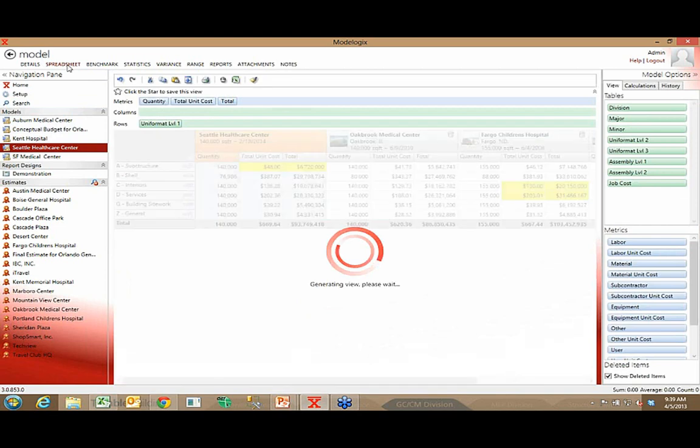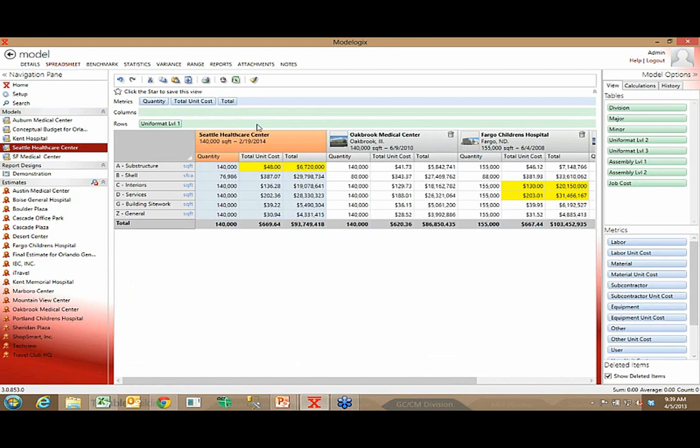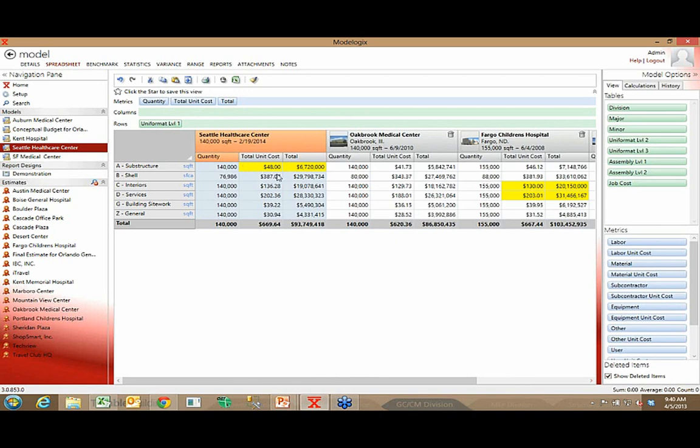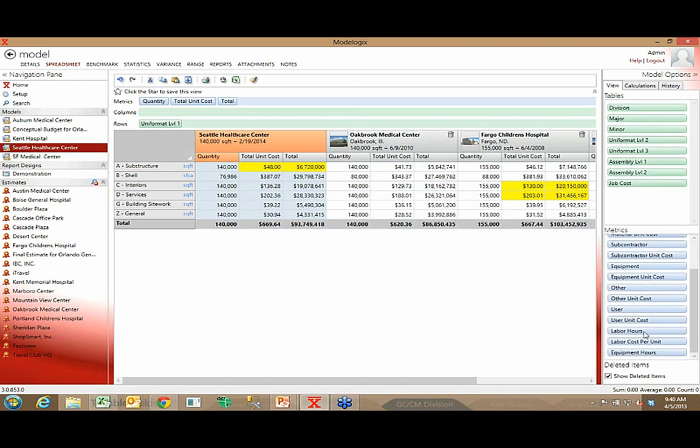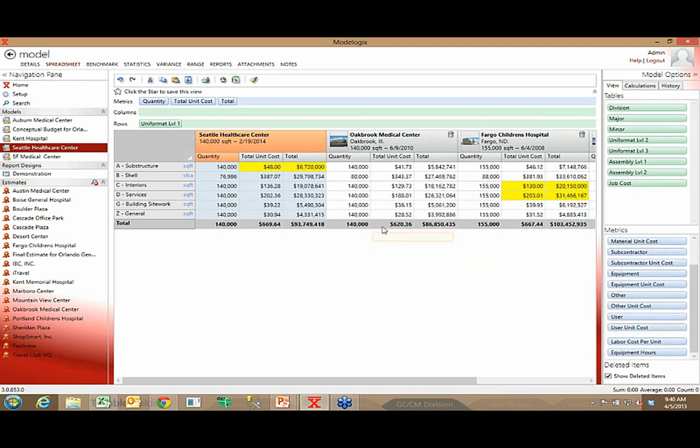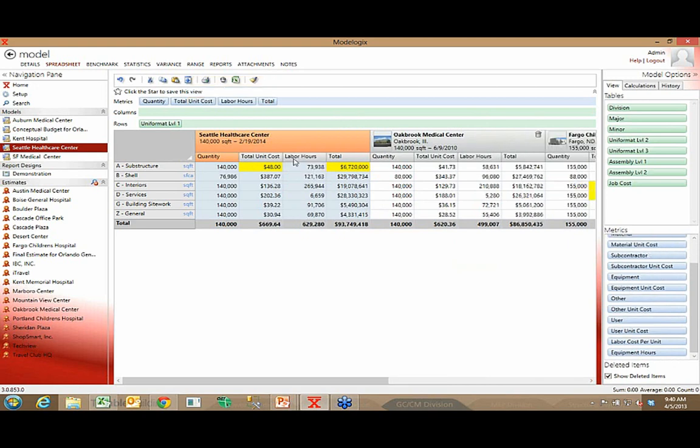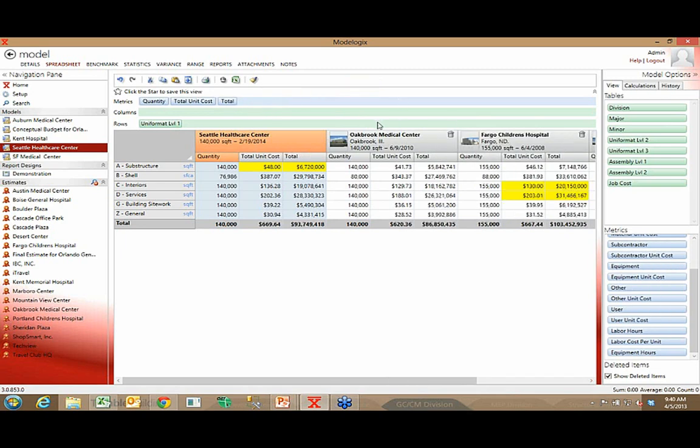So I can slice and dice this data, view it any way that I choose. What you analyze is also user-defined. You'll notice right now I'm kind of modeling. I'm looking at quantity, total unit cost, and total. I'm by no means limited to that. You might also be wondering, what's the average number of man hours per quantity for each of these levels? One of my metrics that I bring into Modelogix was the number of man hours. So if I take labor hours and I bring that up here, notice now I can see the average number of man hours for each of these areas. So the what you analyze in the model is also, again, under your control. And if you want to remove it, you just drag and drop it off the column.